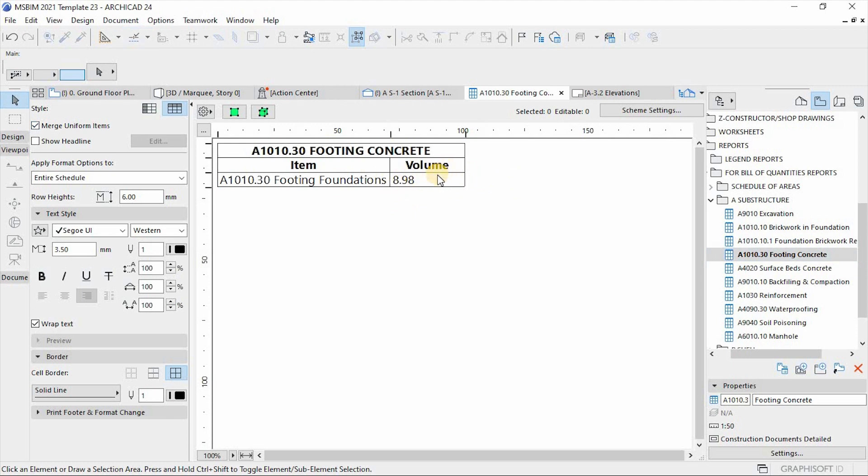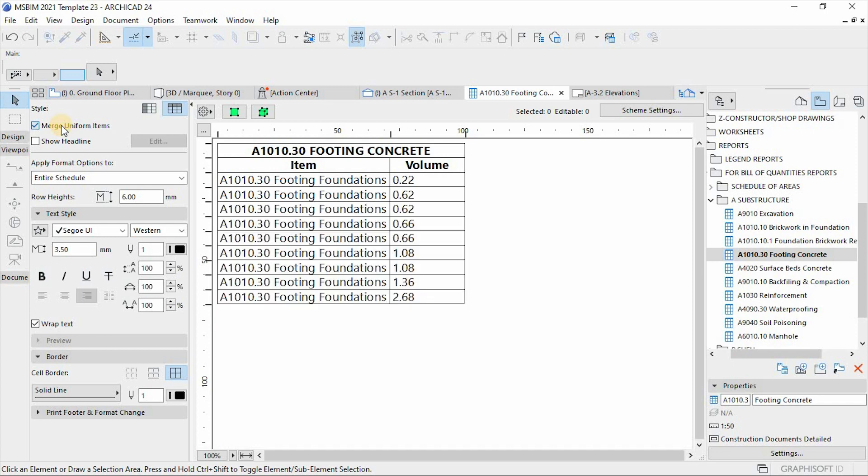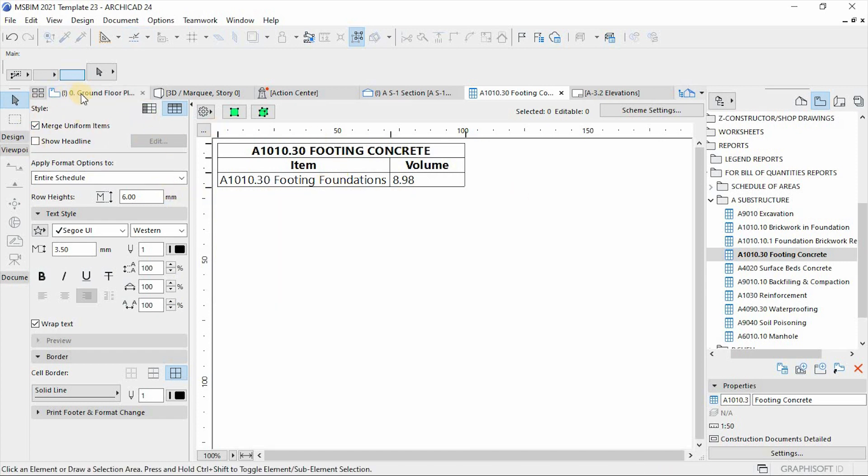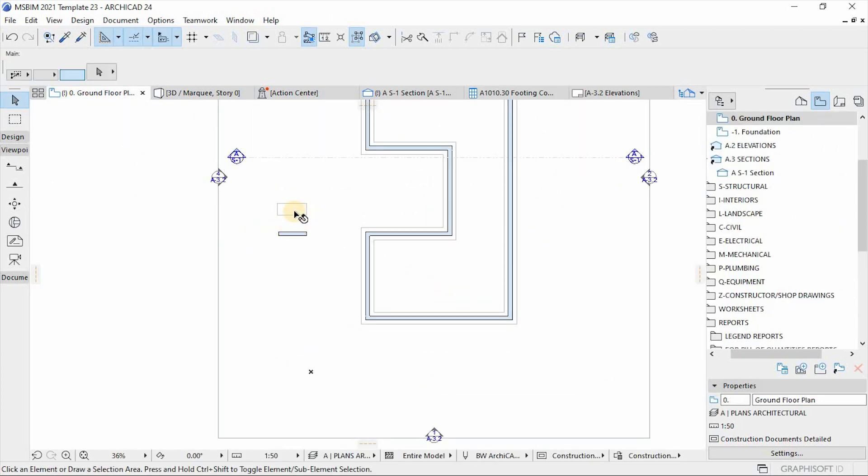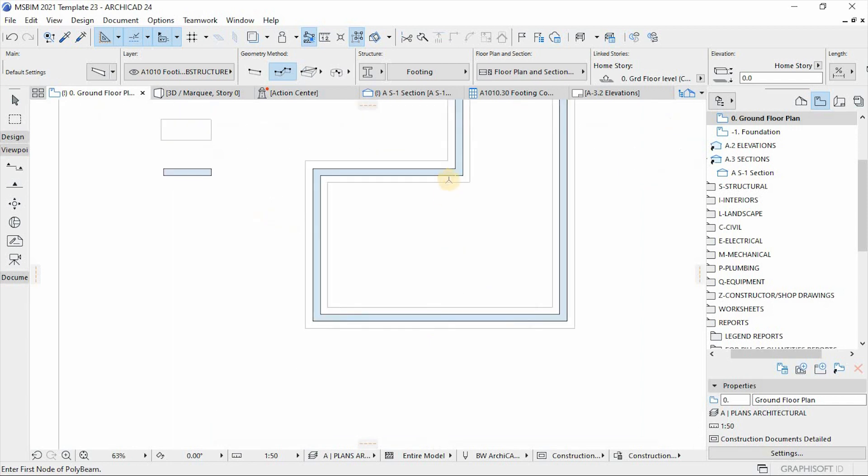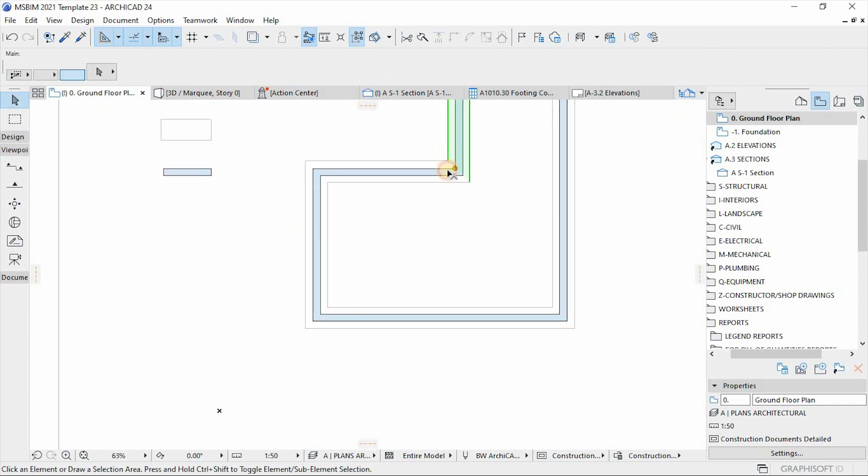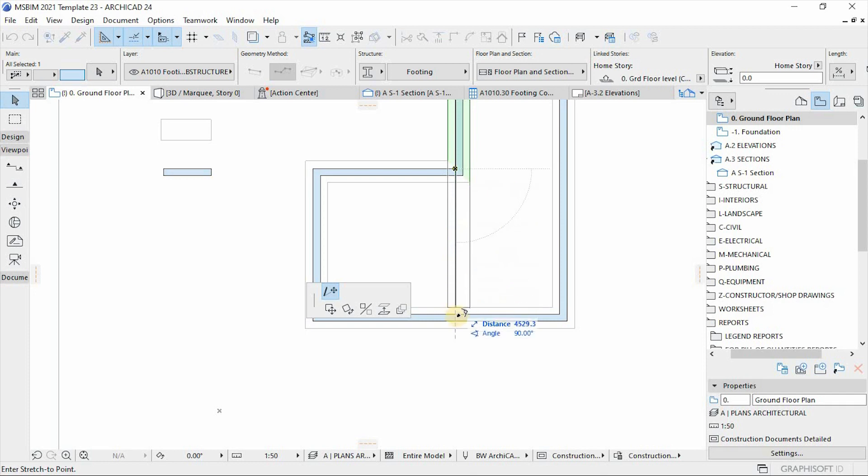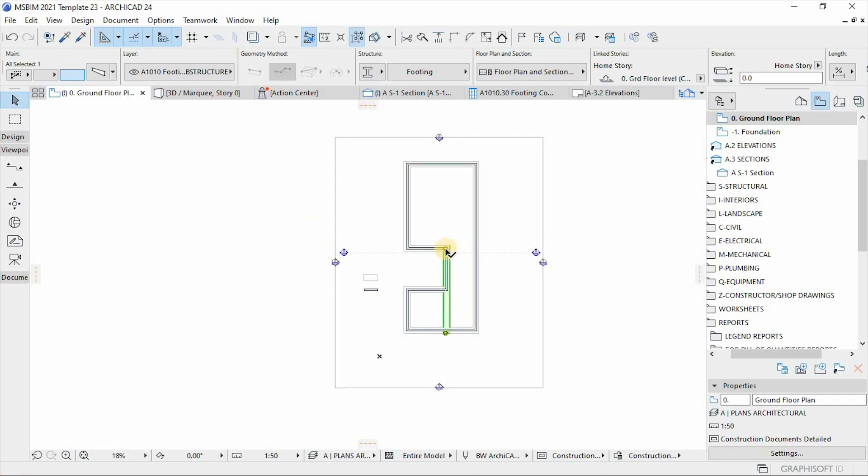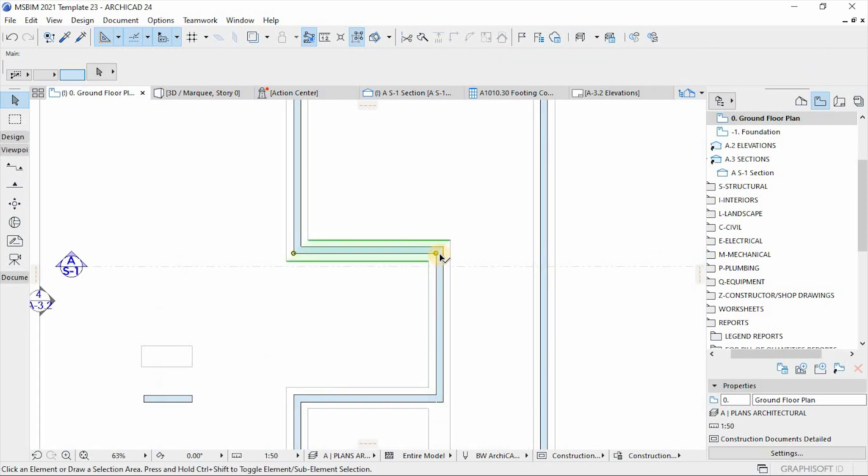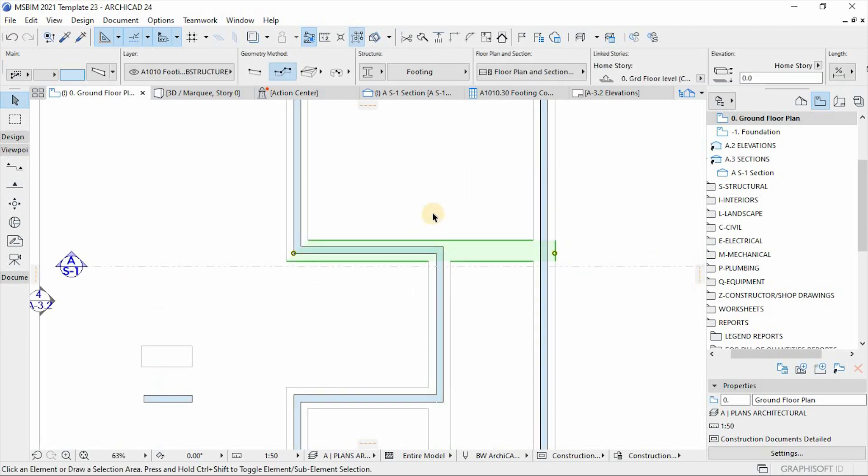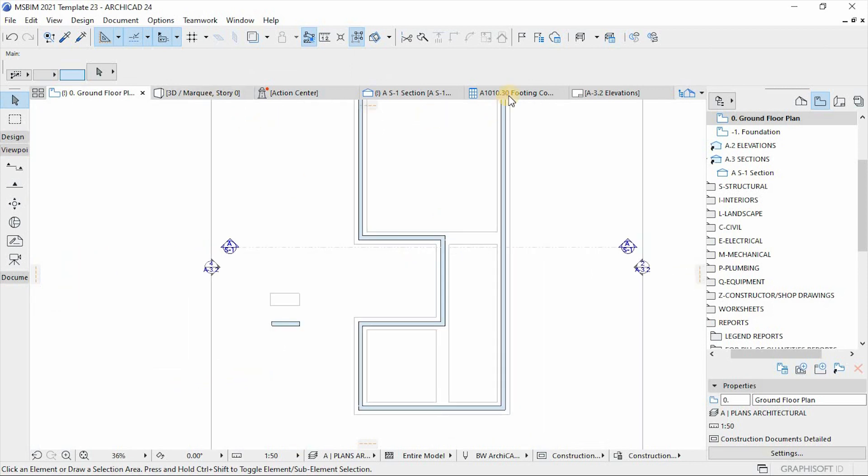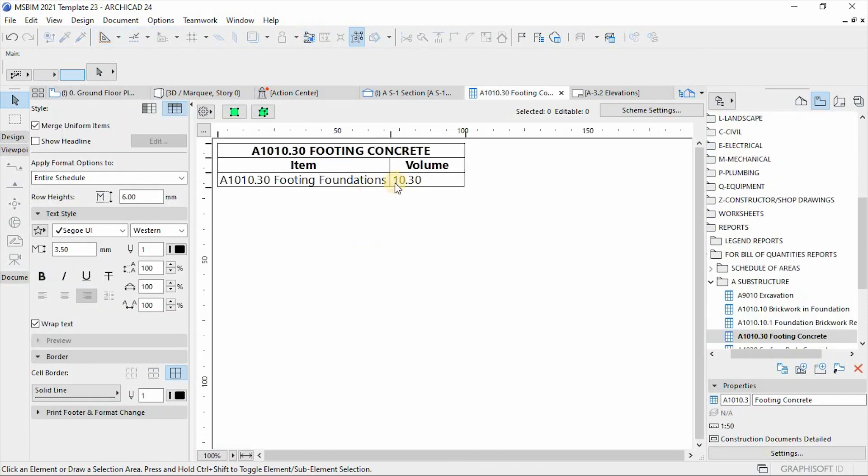And if you check another report under footing concrete, this is being estimated. The cost has been derived from the volume for concrete. So if you unmerge this, you also check there are quite a number of elements there under the concrete. If you go back to the floor plan and then adjust or edit the footing design, automatically the volume of this data will be updated.